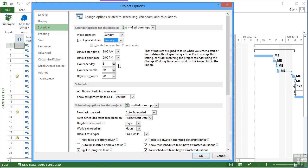Now to change these values after a project has already been created, as ours has, with its durations, with its assignments, will cause all the project lengths to change because the calculations have now been taking place on an eight hour day.